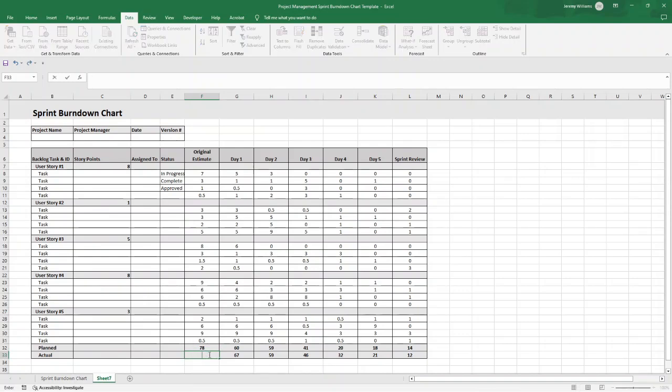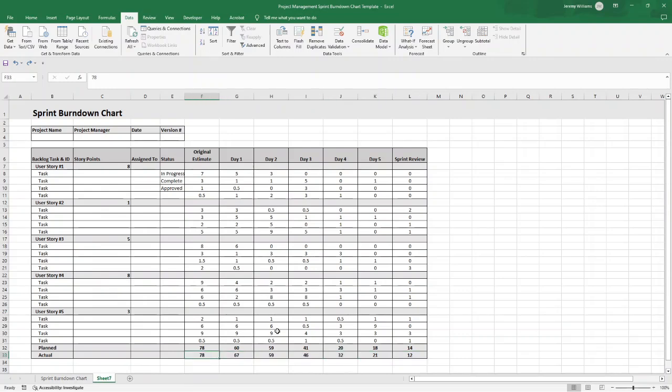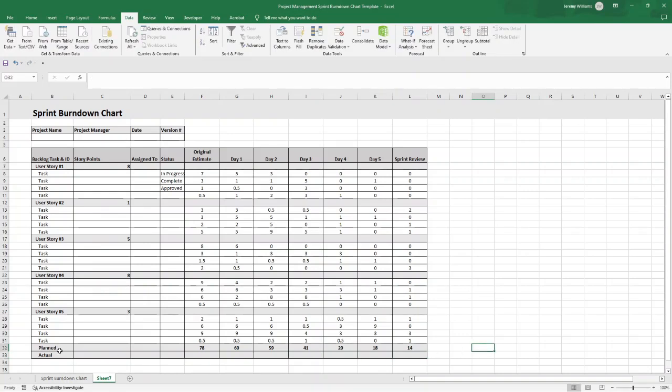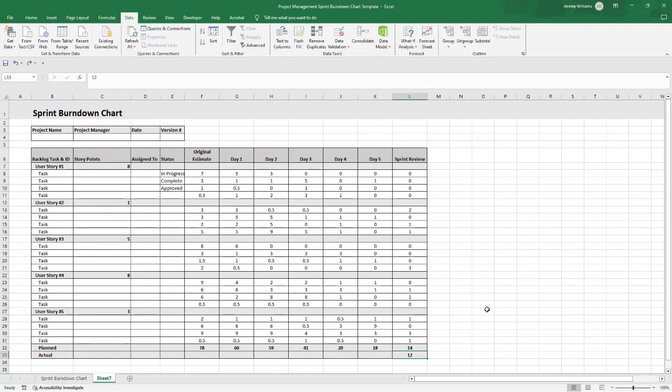As you can see, we've put in some dummy data for the original estimate and also for the days here. The Planned, when you're starting this, you'll probably just have the Planned. You won't have the Actual. You'll be updating this as the sprint goes on. I have put in dummy data here and you will have this by the end. If you don't have data at this point for Actual, just leave it blank but make sure you have a placeholder.